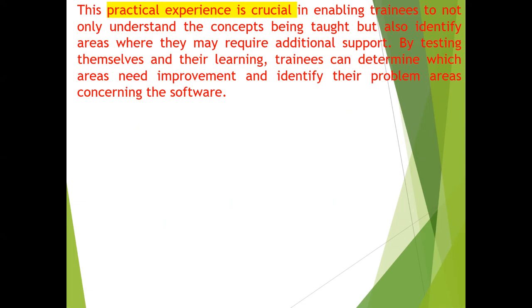Okay, what is the solution? I can do this in a very simple step. In Primavera, I will tell the software, this is the maximum resource available to me from the organization's point of view, and based upon that, give me how the project schedule will look. So before the plan gets approval, you can do this. This is what you call resource leveling. We are going to do this.